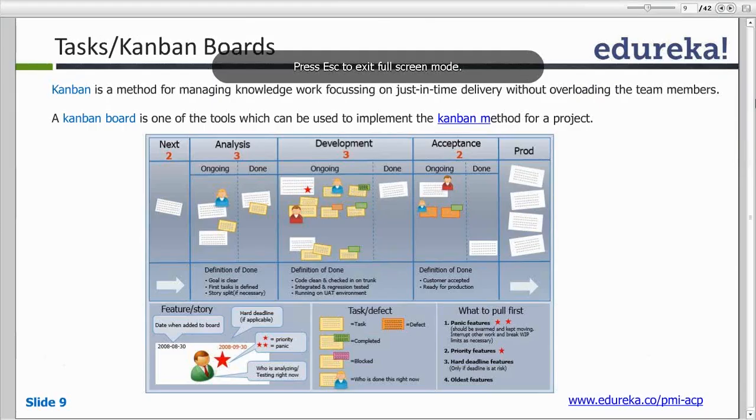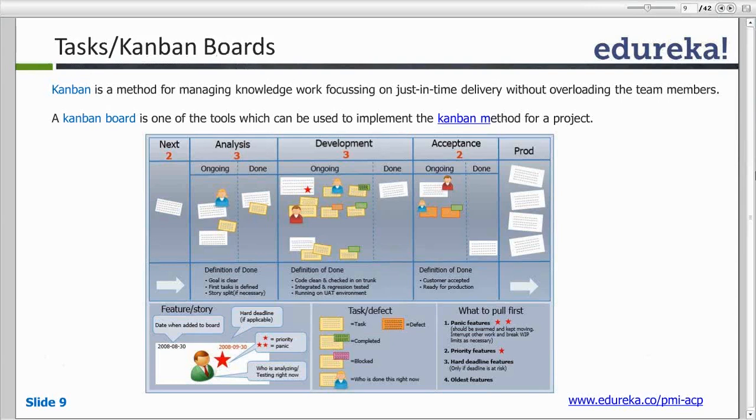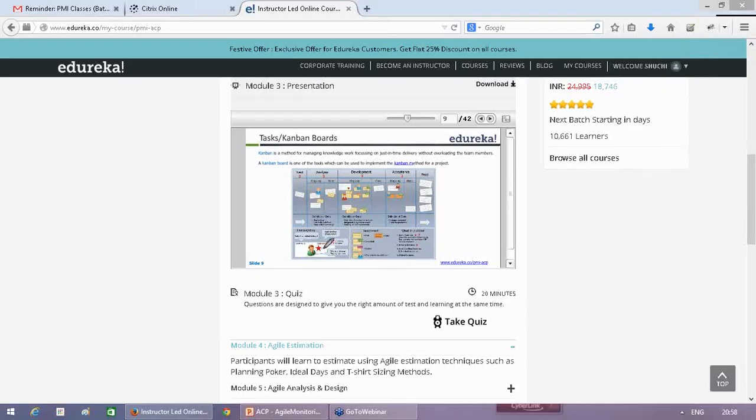Like here you have feature story, right? So if you're working on an iteration, it might tell you which two stories you are working on for two iterations. Here you might have a risk section, which says this is the risk we see, and if it has been mitigated, you would probably cut it off, or maybe erase it, or if it's getting overdue with the due dates, you can just start turning it red. This is how you want to visualize it. Okay?